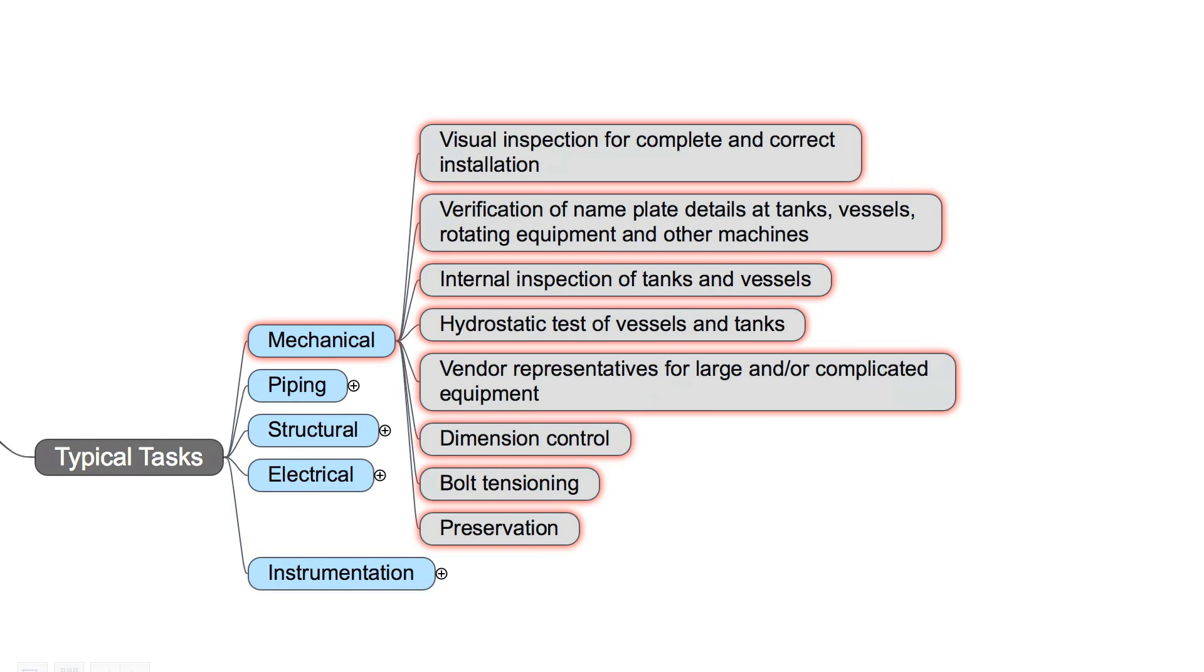Typical tasks for mechanical are, for example, visual inspection for complete and correct installation, verification of nameplate details at tanks, vessels, rotating equipment and other machines, internal inspection of tanks and vessels, hydro-static test of vessels and tanks. It can take a long time. Don't underestimate hydrostatic tests.